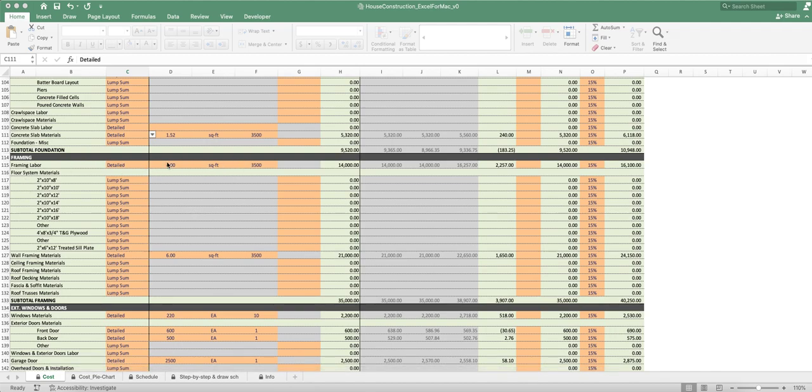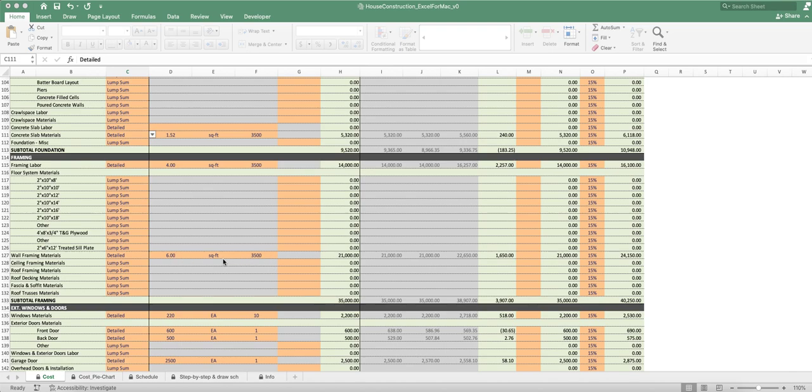I just had an all-encompassing price per square foot and put the cost per square foot here. Here's the unit square foot and here's the number of square feet, and then that multiplies out to get $21,000 for the framing materials.